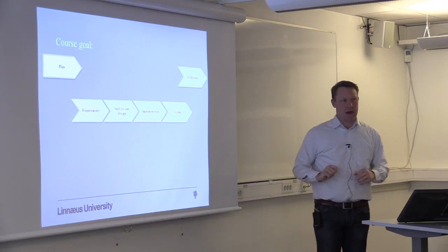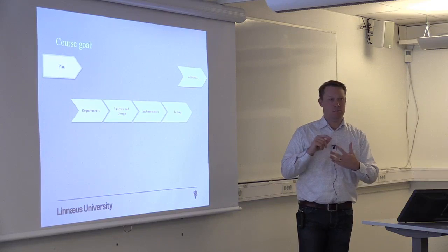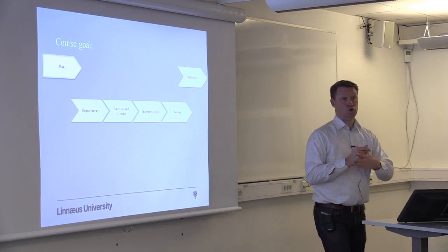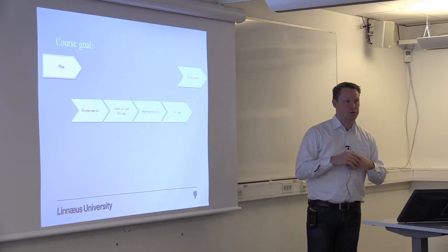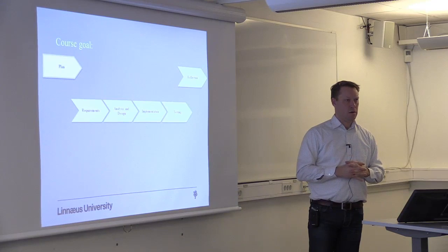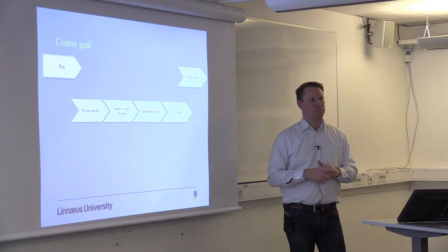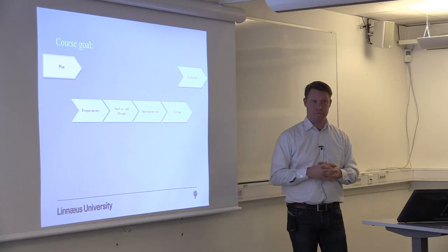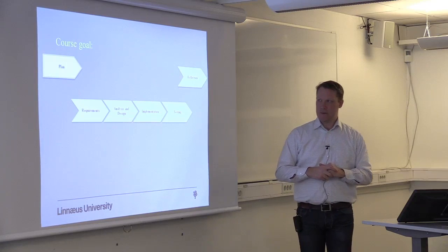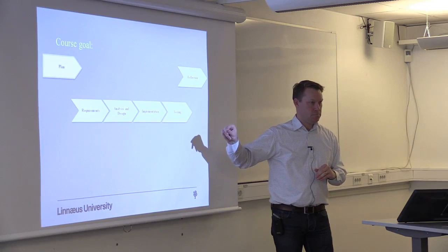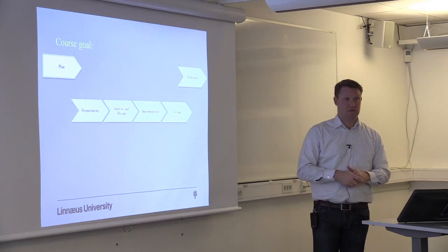And the activities you should plan are, and these are generic terminology, understanding the problem, defining the requirements for what you should do. Further understand in detail what you should do and come up with a design of your software and your system. Implement this design and then test it. That's the validation part, to make sure that the pieces you implemented fit together. And it doesn't matter what name your process has. You will always go through these steps. And these steps will have different names, but the purpose is similar, at least in nature.